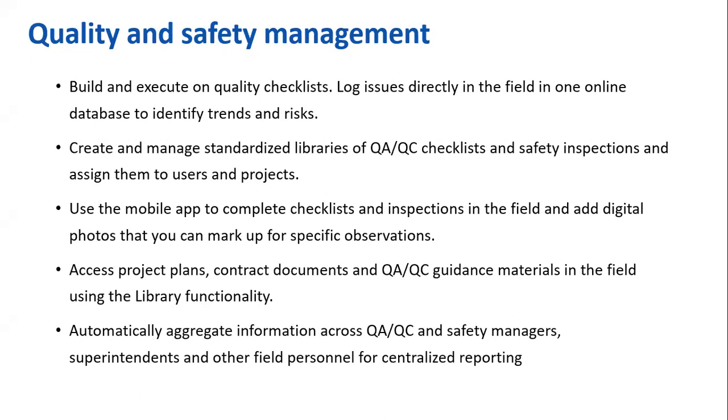Then quality and safety management. Build and execute on quality checklist, log issues directly in the field in one online database to identify trends and risks. Create and manage standardized libraries of QA/QC checklists and safety inspections and assign them to user and projects. Use the mobile app to complete checklists and inspections in the field and add digital photos that you can mark up for specific observations.